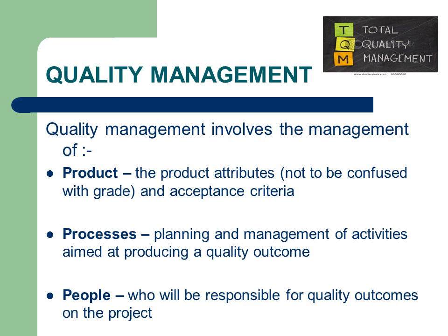Product quality measures and techniques are specific to the type of product produced by the project. Whilst quality measures and techniques for developing an IT system differ from building a nuclear power plant, project quality management applies to both. Failure to produce a quality outcome will have serious consequences for the project. For example, meeting a project schedule objectives by rushing planned quality inspections may produce a poor quality product when errors go undetected.